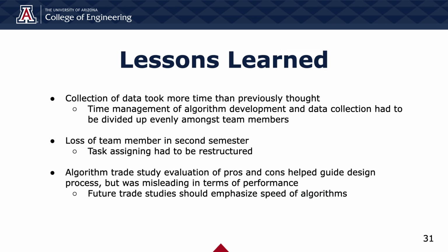Throughout this project, we have learned a variety of lessons. The first was essentially time management. Data collection took much more time than we originally expected, so we had to divide up tasks accordingly. We also lost one of our team members during the second semester, so we again had to restructure our tasks to account for that.